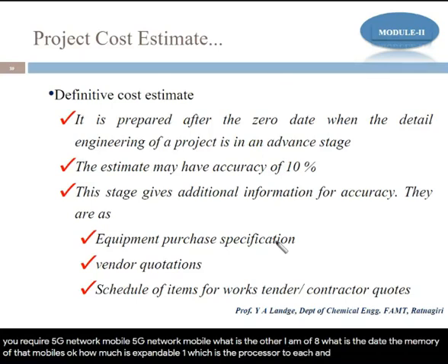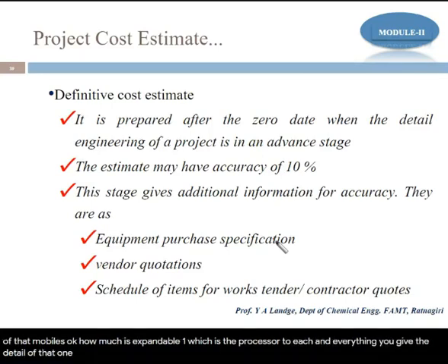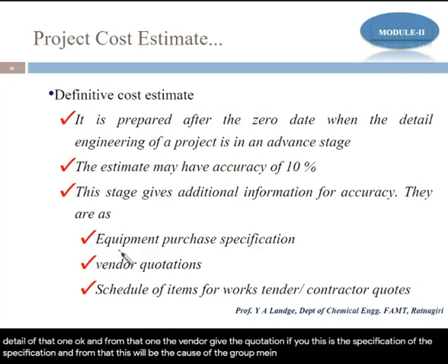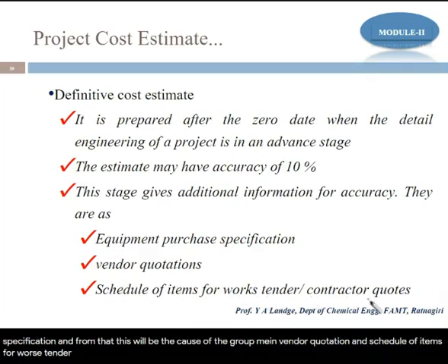So each and everything you give the detail of, and from that the vendor gives the quotation. They say yes, if these are the specifications, this will be the cost of the equipment. So vendor quotation, and then schedule of items for work, tender, contractor quotes.